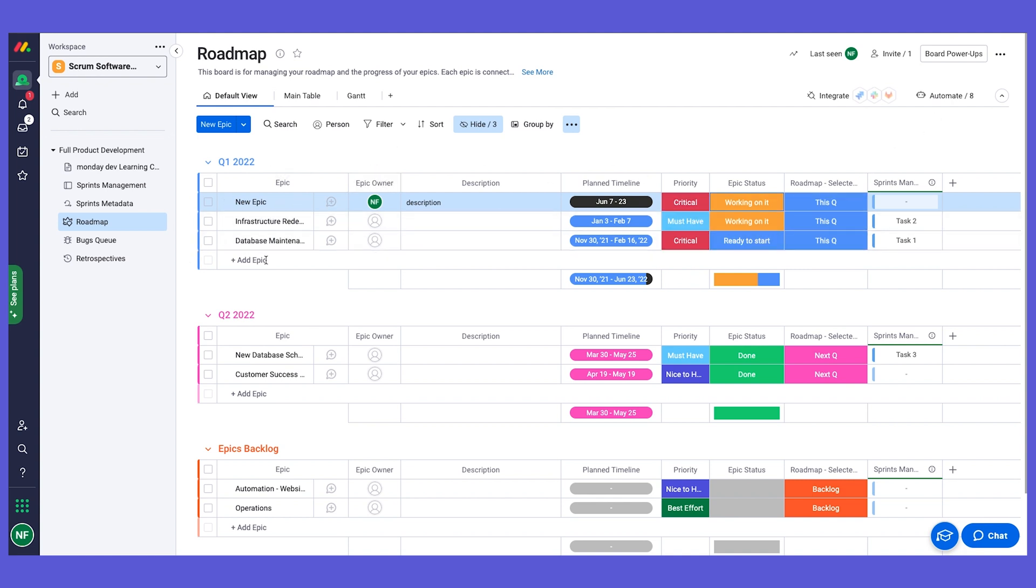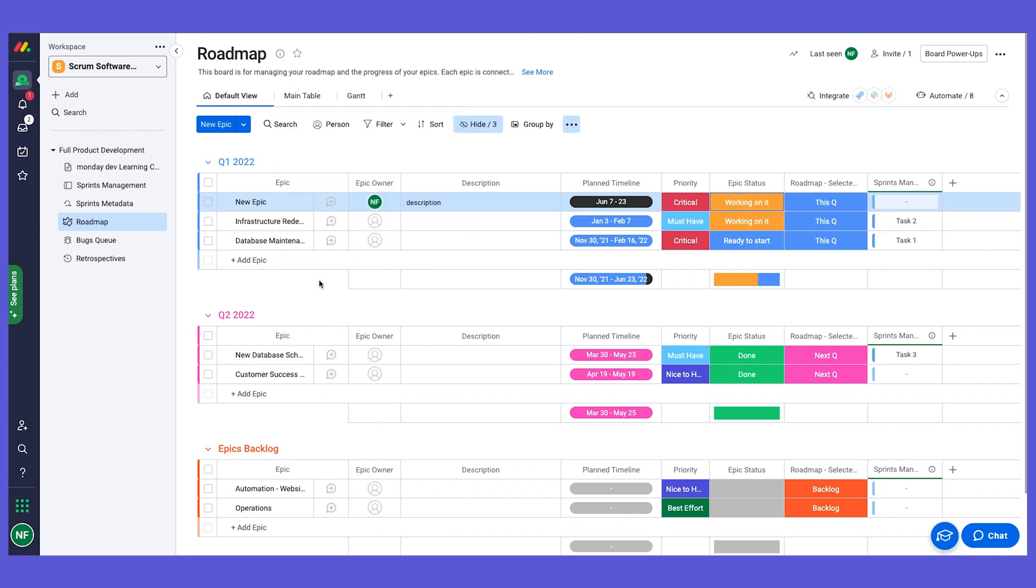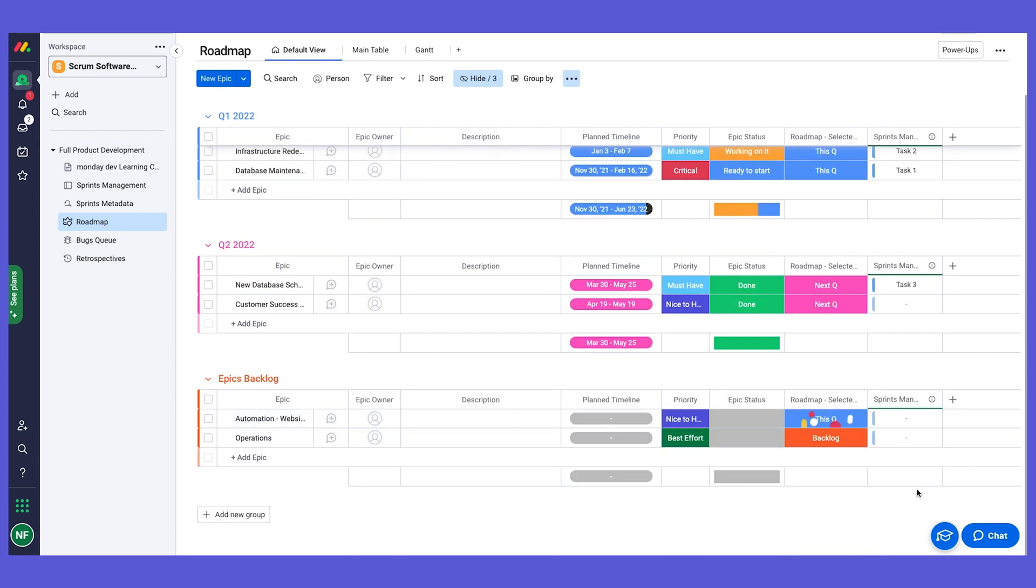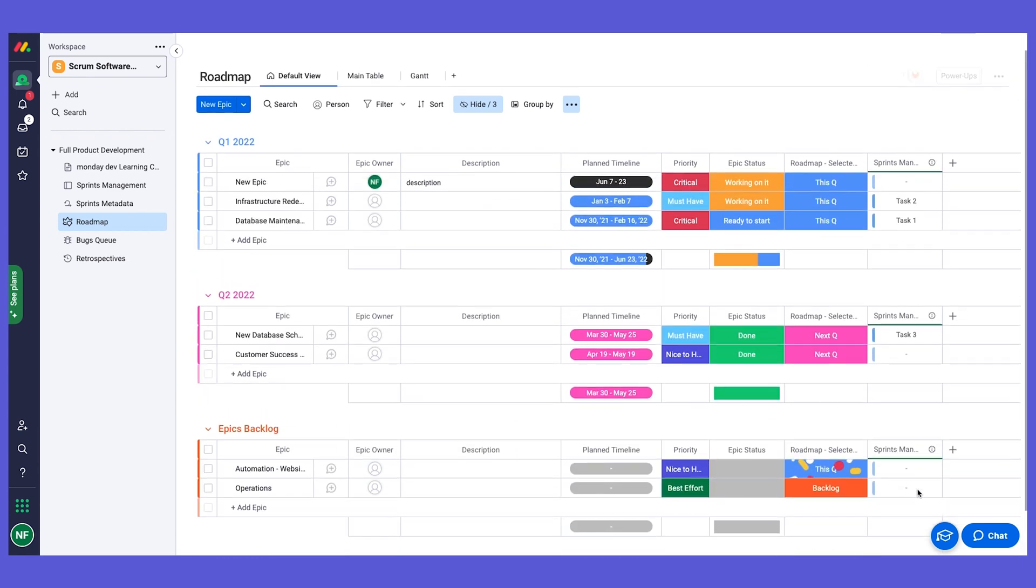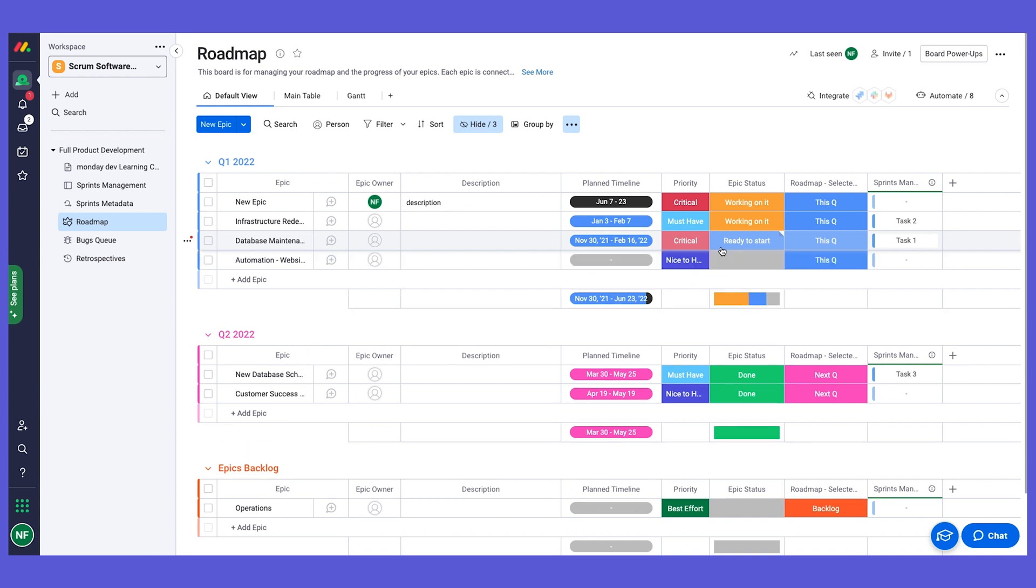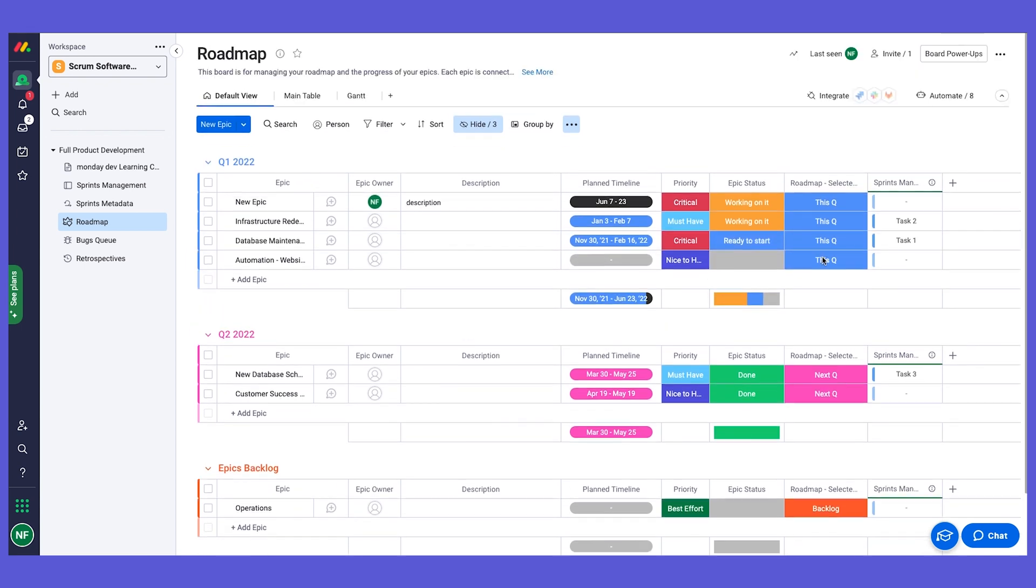For example, we have an automation to say that when an epic is created, automatically assign the owner as the user that created it. We also have an automation on this board so that if I have an epic on the backlog that I want to move to the current quarter, which is going to be my top group, I can just change the status to this queue and it's automatically going to move to the top group.